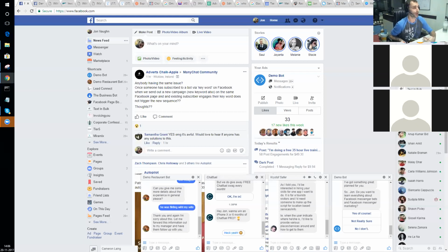And then we break the project plan down into milestones so that we can do reporting to see if we're on track, if we're on schedule, or if we're not. Then once you take that project plan and agree to it, we actually commence the development. We do what's called breaking ground, and then we go in and start the development.